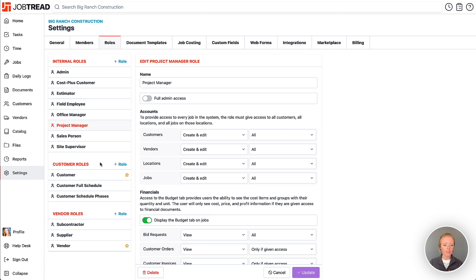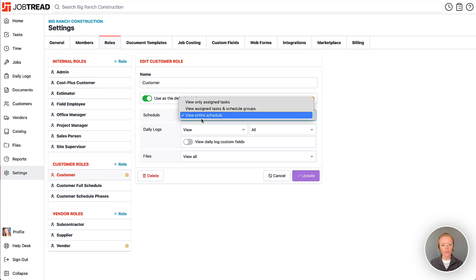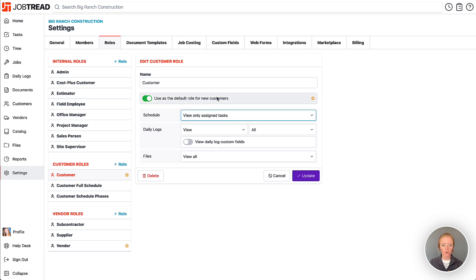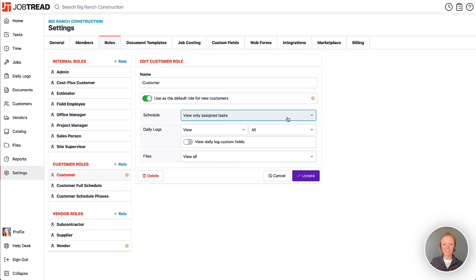So for your customers there may be some customers that you only want to view the tasks that are assigned to them. So I can make this customer role my default role for all my new customers to have and I'd probably give them the most limited visibility because you can always increase visibility from there but it's a little more difficult to remove visibility from your customers once they see a full schedule.